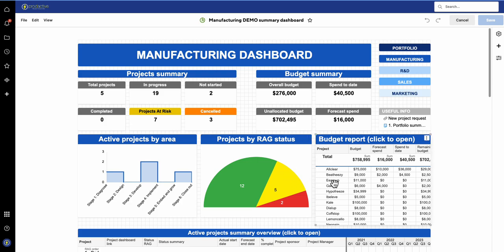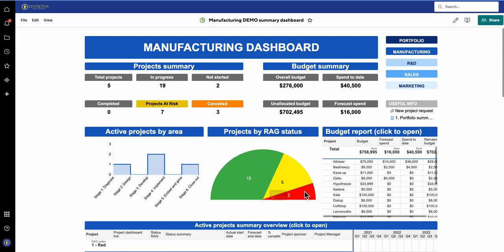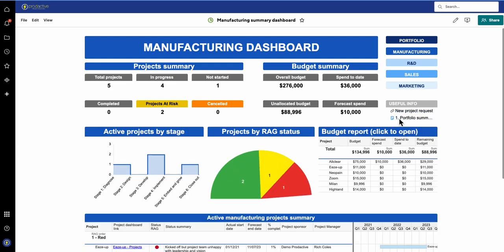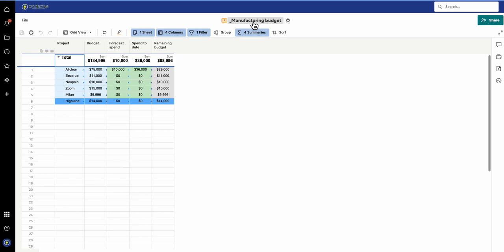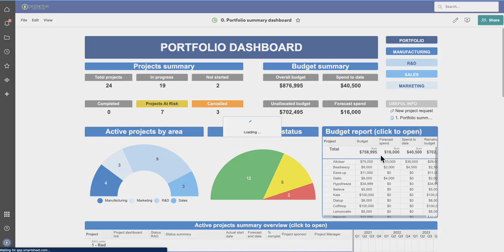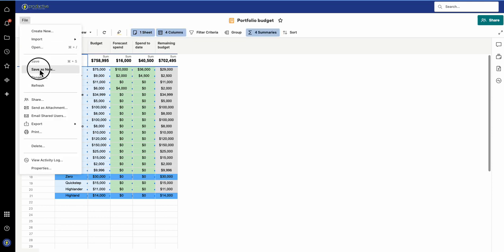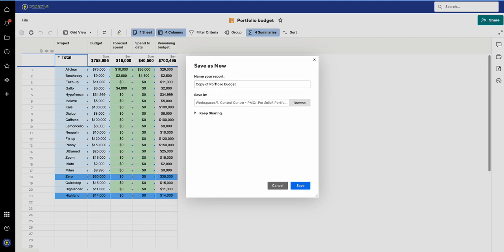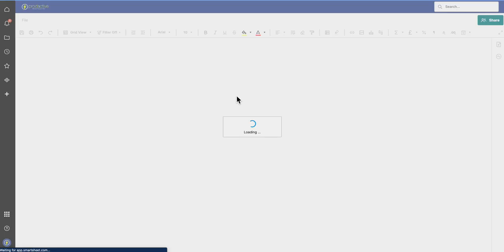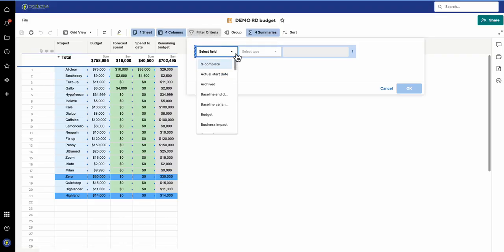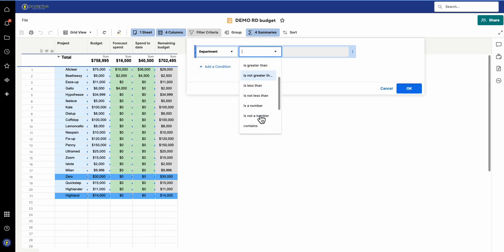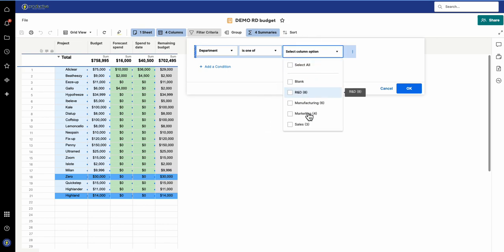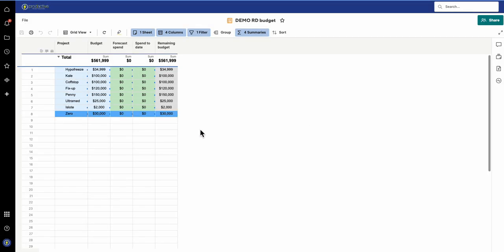For the reports, I go through projects by RAG status and change those to the metrics specific to each area. For the budget report, let me go back to the portfolio budget as an example. I click Save As New and call this one 'Demo R&D Budget.' Then I go into the filter criteria, go to department, select 'is one of,' and change the value to R&D. That way I've got a department-specific report I can link in.